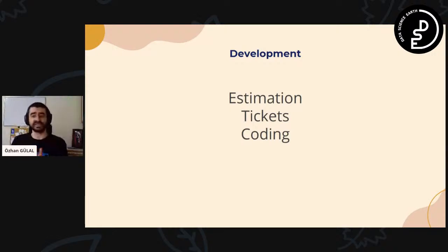The business analyst creates a sprint. And what is a sprint? A sprint means the total ticket hours for one developer for 2 weeks or for 4 weeks. We can assume that for 2 weeks, the total hours usually equal 70 or 80 hours, but it depends on your company, your project, your customer, and your management.